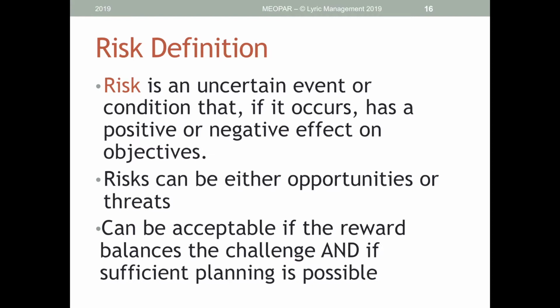And we often only think about risks as being negative. We talk about things as being risky. We talk about risks that we don't want to take. And so we often see risks as being negative, but truly risks are things that can be either positive or negative. The thing that we do is risky, but the potential outcome that it would have can be either positive or negative. And so from a project perspective, we need to define our risks as either opportunities, things that could improve our project and make the outcomes better or make our project more efficient or effective. And risks can also be threats, things that will undermine or challenge our ability to be successful in the completion of our project and the achievement of our objectives.